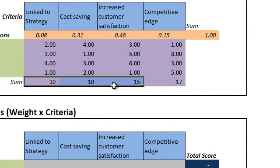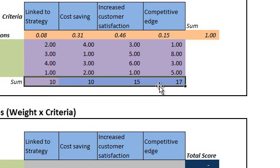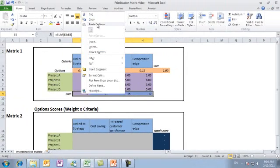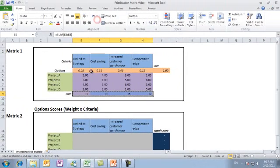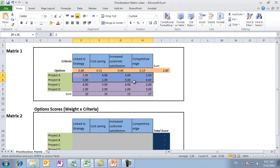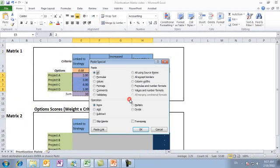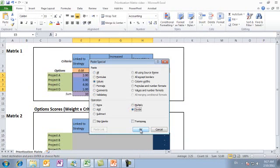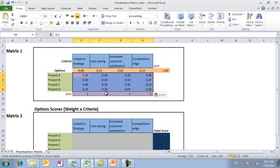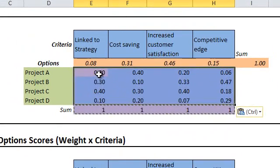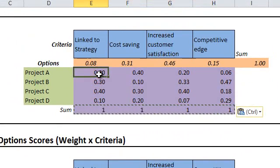We will do this for all projects, then sum up the project ratings for each criterion vertically. After that, we need to do the same with regards to weighing the rating on one point. So I'll copy the sums, then select the ratings, right-click, paste special, values, divide, and OK. So all ratings are now based on one-point scale.